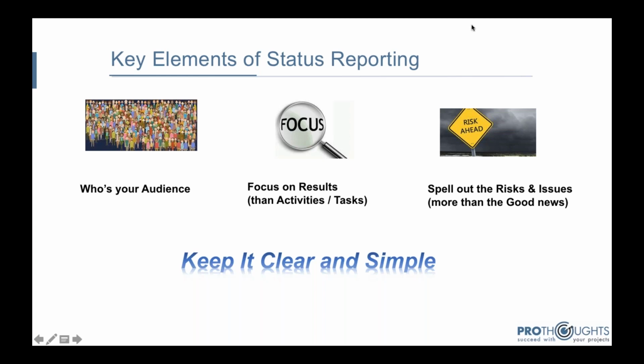But the idea is on what you are accomplishing. Are these activities leading to a particular result, or is that deliverable going to be missed? This status report is generally for senior management, and that's how we prepare it. So milestone reporting is a better way, and the focus shifts from activities to results. If you can show what you have accomplished, that will be much more value adding than showing the efforts you have put into your project.